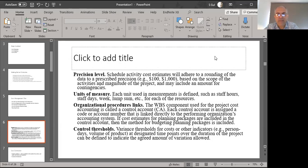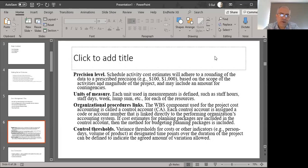The unit of measurement covers how staff hours, staff days, and working weeks are measured, what a lump sum payment is, and when it will be made — weekly, at the end, or 50% at the beginning and 50% distributed across your expense chain. The organizational procedure link means that because we have a WBS and a WBS dictionary, there's a chart of accounts and code of accounts available, so our estimates should be linked with those control accounts. Control threshold is the idea of when you start getting worried about your expenses.